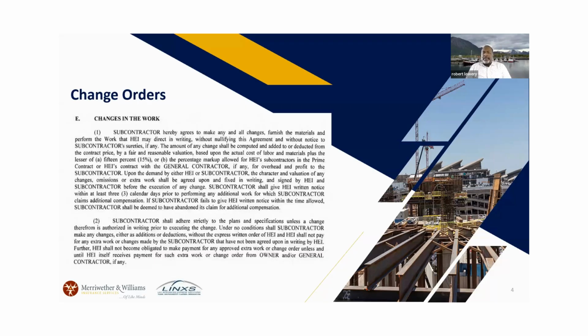Yeah, it's fine and dandy, but he is not the final decision. It's whoever signs your contract or the PM. So you want to make sure that you can go back and go through what exactly is required. Just because the superintendent is telling you to do things, he might not be adherent to your subcontract agreement. So that's why you want to be able to read through this and fully understand.